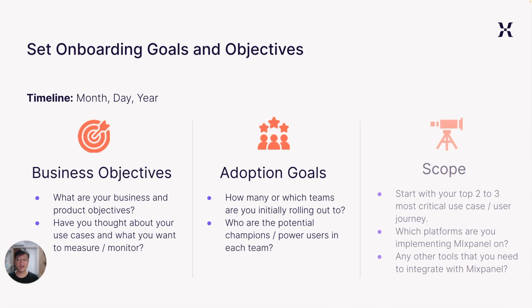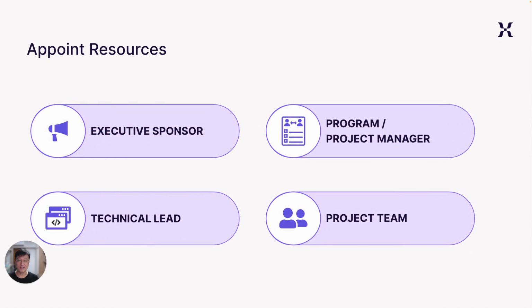Scope your implementation. Key here is to start small. Using the top 2 to 3 critical use cases, start with your primary platform with the most user base and identify any potential third-party integrations. Appoint the key stakeholders that will drive the onboarding process.